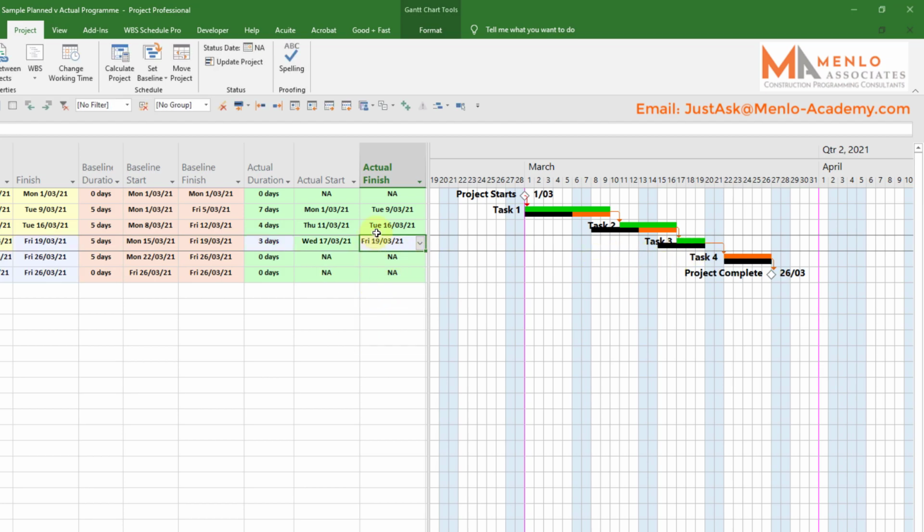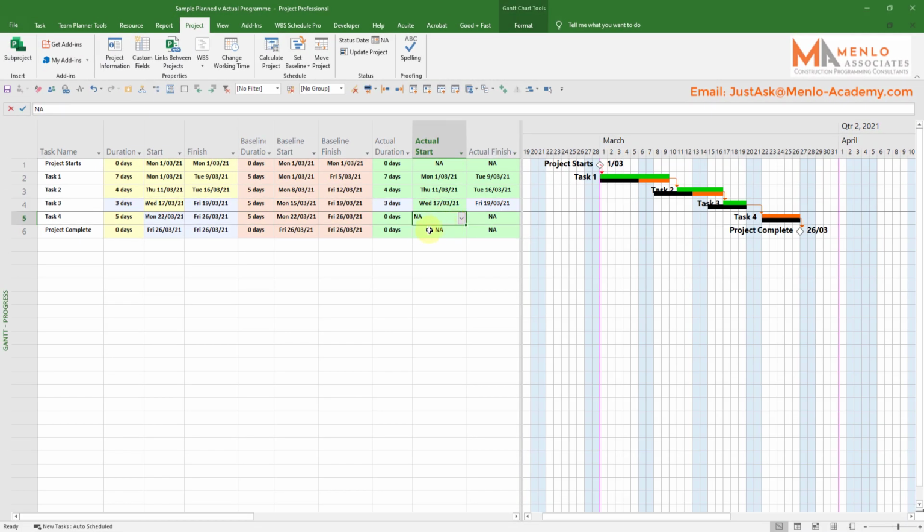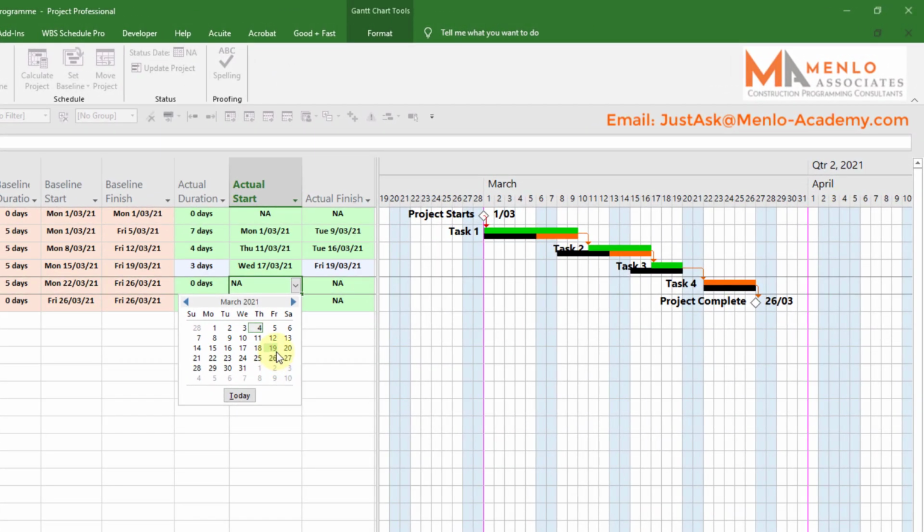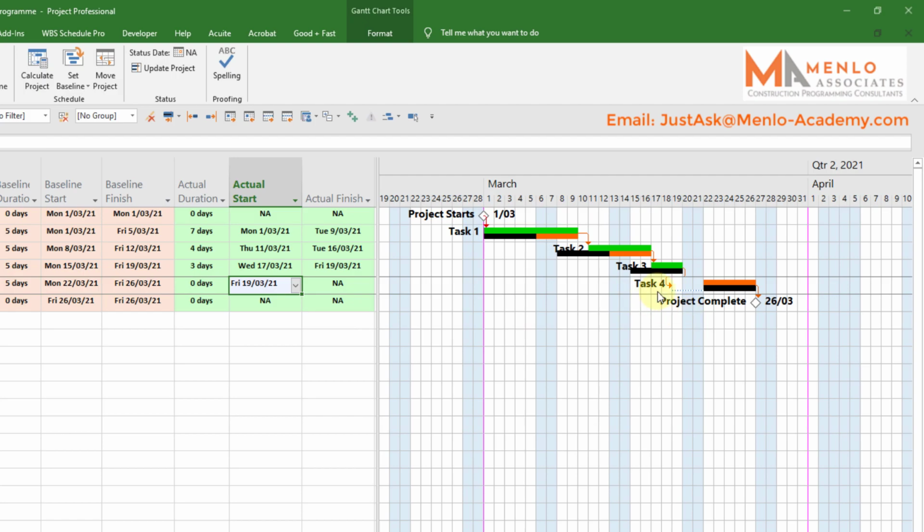and the job, you see, it's rejigging what's actually happening to reflect how things are going on the job, of what we expect, etc. If this job was expected to take 5 days and again takes 2, but I'm actually starting this final job early, you see, under the logic, this job shouldn't be able to start until the 22nd. But let's say we start it on the 19th and we get an early start. You can see now this little dotted line shows that it started early, and it split the job, because at the moment it's still trying to maintain the original logic.